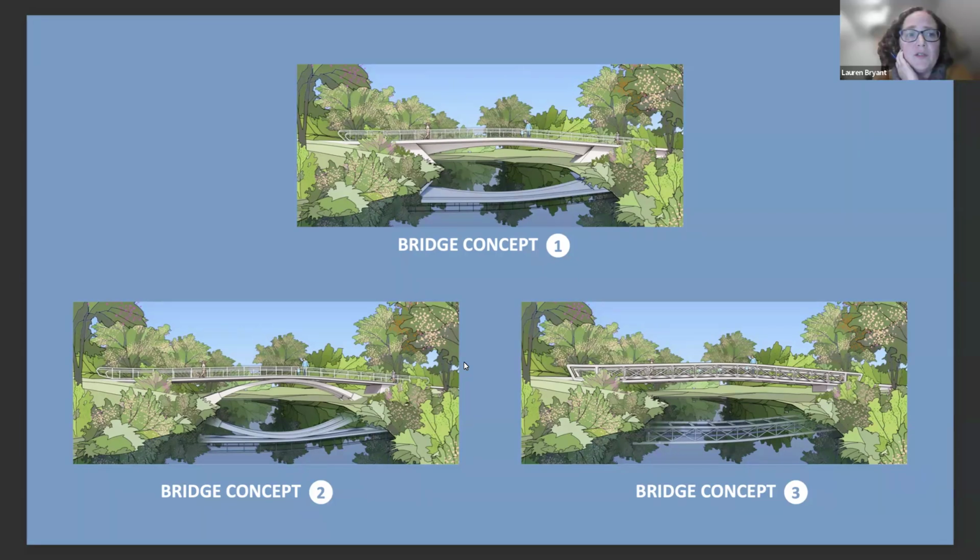Yeah, that's all. I think those are good questions, Karen. And there is a portion of the project, and Kyle might be better to talk through this. There is a portion of those connections, some of the crosswalks that you're talking about, some of the curb ramps, that will be done as part of our project, because in order to make the Boston Parks portion of the project accessible, we have to cross the DCR property to get there. So there are a portion of those that we are doing as part of our project because we have to. And the other portion, we have been talking to DCR as well, in terms of, gee, wouldn't that be nice if it were all done at the same time? And I know that they were looking at some funds that they might have. And so we are continuing to push that conversation. So if you want to continue pushing it too, that's fantastic.